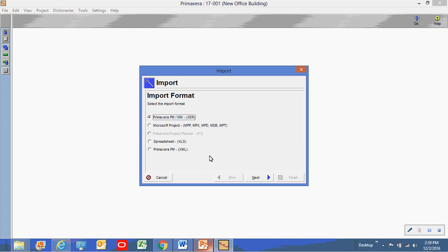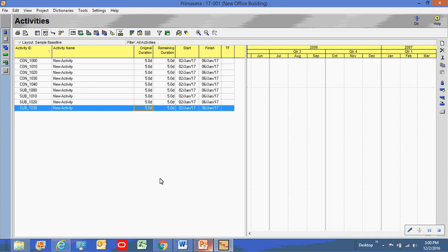Now, while we're talking about the file format, the other advantage of this program is that you can exchange files with other people using other Primavera products. So if they're using P6 Professional, no problem. EPPM, no problem at all. Now the other way around is a little bit trickier because they need to know that you're using Contractor. They need to send you a file that's going to be for Contractor. So when they're exporting it, those other users have an option of choosing Primavera Contractor as their export method. But otherwise, I've really had no difficulty at all exchanging data between the programs.